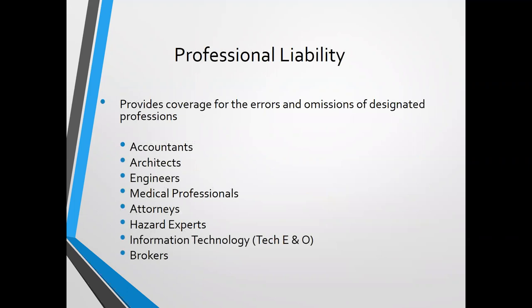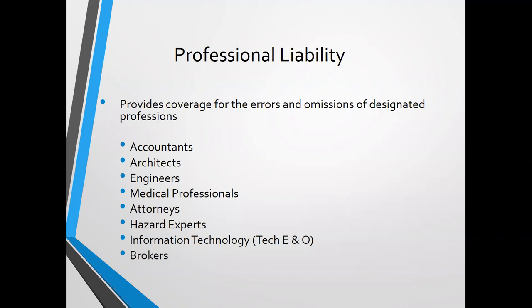Professional liability has been growing in necessity, especially in the past five years. This is coverage for the errors and omissions of designated professions: accountants, architects, engineers, medical professionals, attorneys, hazard experts, and information technology — which may also be encompassed in a cyber liability policy. Contracts for a broker of record for insurance would also be applicable. When dealing with consulting contracts, no matter what the consulting is for, professional liability at least needs to be looked at as to whether it should be included in the insurance requirements.